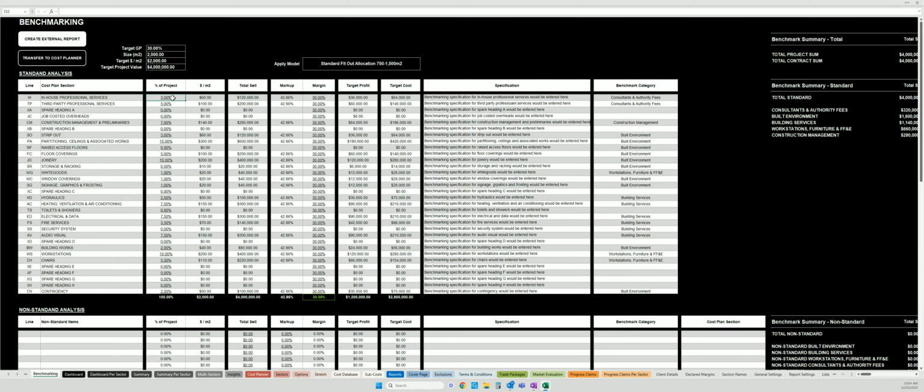So we can either adjust the percentage, adjust the dollars a square meter, or adjust the total sell. So I may want to drop the 120 down to 80. I enter that in, the percentage is adjusted, the dollars a square meter is adjusted, and I'm showing 80,000. The system's gone red, just to show that we haven't completely allocated the 100% of the standard. Now that won't stop you from doing anything, but it's just a warning to say, hey, you haven't allocated 100%.